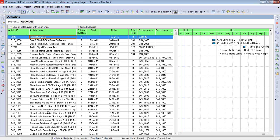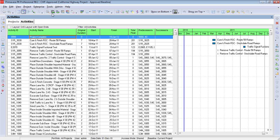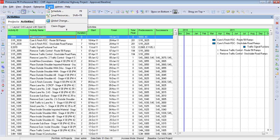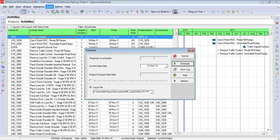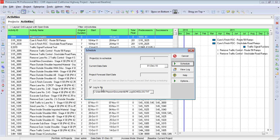Now, the other method of checking for open ends, which I especially recommend as you're getting ready to do your final production of this schedule, to hand it to the owner, that sort of thing, is to look at the schedule log report. The schedule log is generated under Tools, Schedule, or the F9 key is the shortcut. Now, before we schedule it, what we're going to pay attention to here is this log2 file.